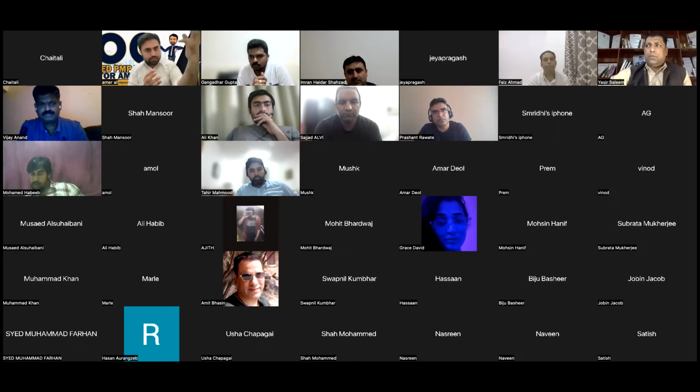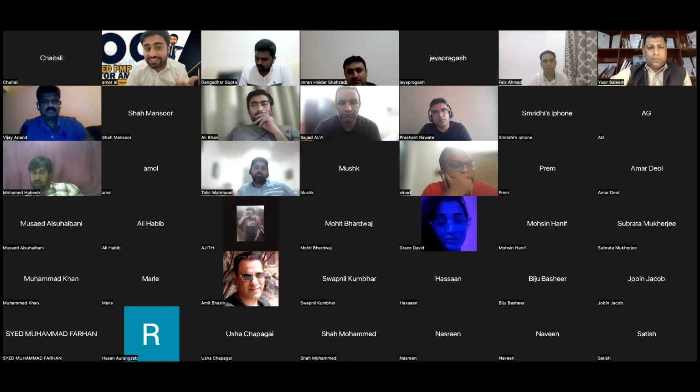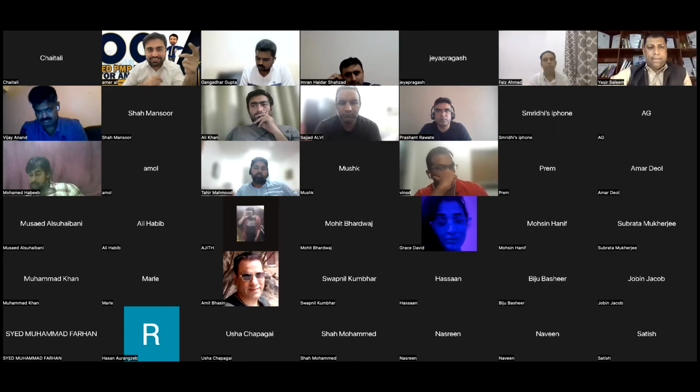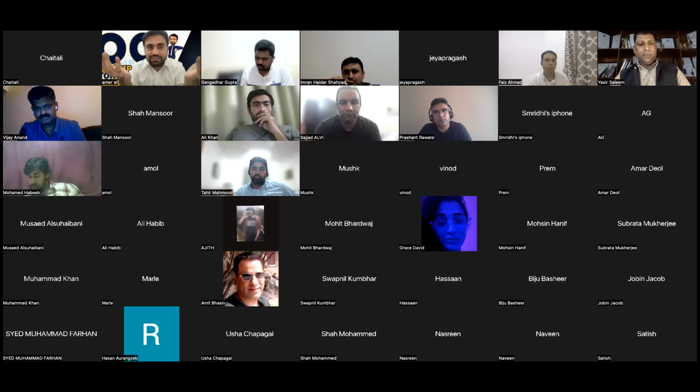So a problem has occurred, we put it into the issue log. Now, the problem has occurred, you have updated the issue log, identify the reason why it was not identified before. Root cause analysis, RCA. Now you have done RCA, check if you need a change request to handle it. If you need a change request, raise a change request. Not every time you need a change request. If the change request is raised and approved, implement the change request. Implement it, the issue is resolved.